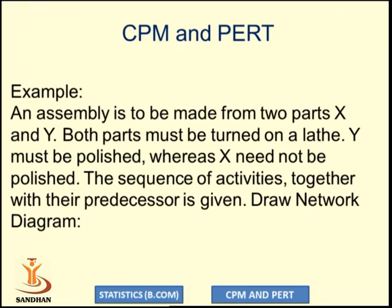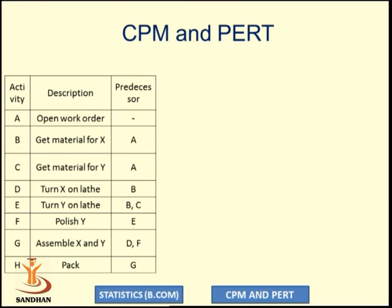Now let us see examples of drawing the network. Suppose we have to assemble a product made from two parts X and Y. Both parts must be turned on a lathe, but Y must be polished while X need not be polished. Activity A is 'open the work order,' B is 'get material for X,' C is 'get material for Y,' D is 'turn X on lathe,' E is 'turn Y on lathe,' F is 'polish Y,' G is 'assemble X and Y,' and H is 'packing of the product.'